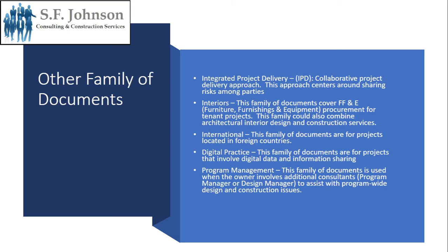Other families of documents that we won't give you actual numbers within the family, but these do exist. So there is a family of forms associated with integrated project delivery, IPD, which is a collaborative project delivery approach. And this approach centers around sharing risks and responsibilities among the parties. So all the forms involved would involve all the parties, just like all of our other families.